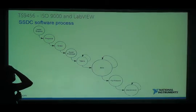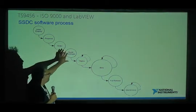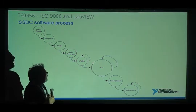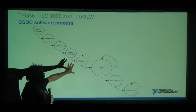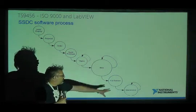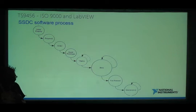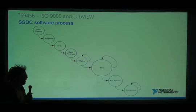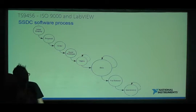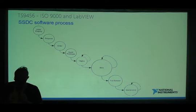Initial inquiry, proposal, order. We always do a quick prototype. If the customer wants to do a factory test, often they don't, they like us on site, but if they do, we have an alpha, a beta, and a full release and a maintenance. And it's a standard kind of procedure. I would imagine everyone's procedure is exactly the same. Now we do beta early, we like to chuck stuff at our customer. I find they're much better testers than we are.